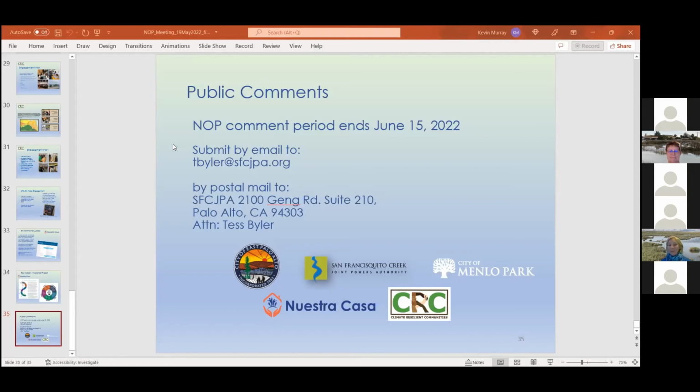I think I'll add, that's safe to say, for levee maintenance, that's all good. I think for vegetation maintenance, I did see a question specific to that. And I'd say that we will be required under the project construction permits to monitor and maintain any vegetation that is part of our ecological restoration and mitigation program.